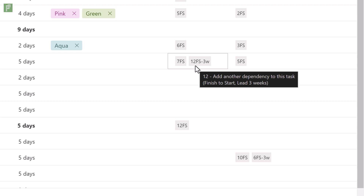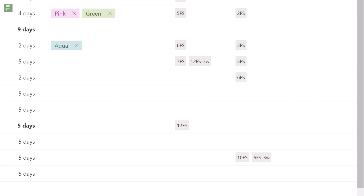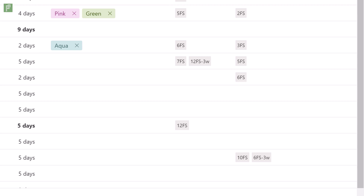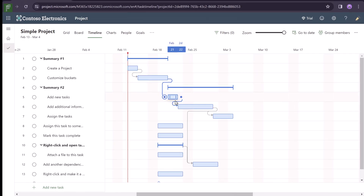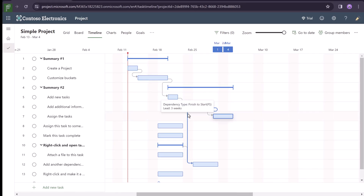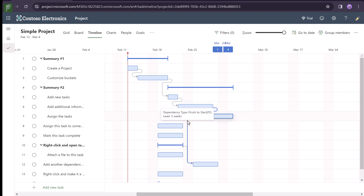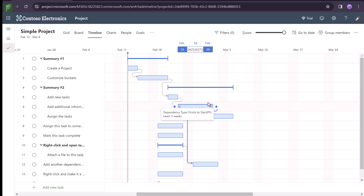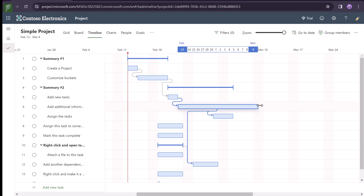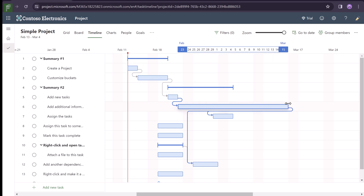This doesn't look fancy in the grid view, but as soon as we go to the timeline view you will start seeing those lag and lead times a lot better. Here we see that lead time is three weeks. There's a dependency finish-to-start and there is a lead time of three weeks. So we can start this task only after task number six has ended, but we have a lead time of three weeks.